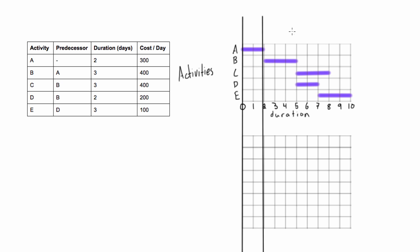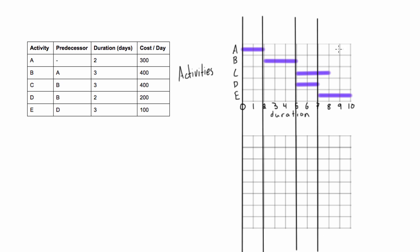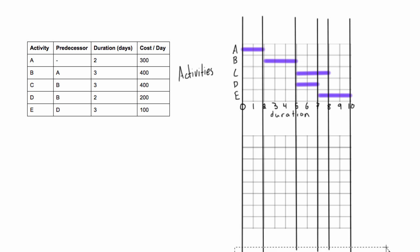The next time any activity starts or ends is at the end of the fifth day, so we draw that line straight down. This method works really well on paper too — just make sure to stack your graphs. The next division is at day 7, where activity D ends and activity E starts. That period is only one day long, and then at the very end of the project we have the end of the last period.